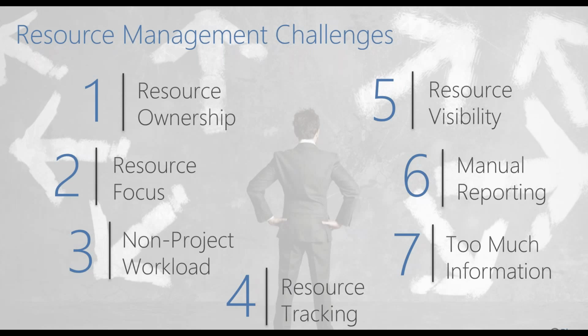Non-project workloads. Our ability to deliver projects in a project management context is often dependent on what other non-project workloads the resources that we depend on have, and do we have visibility or factors in there to determine whether or not we're actually putting a realistic project workload on those resources. Resource tracking: do we have the mechanisms in place to say, even though we've planned our resources, how are we actually utilizing those resources and spending that valuable resource time, and do we have to make adjustments based upon the actual experience?